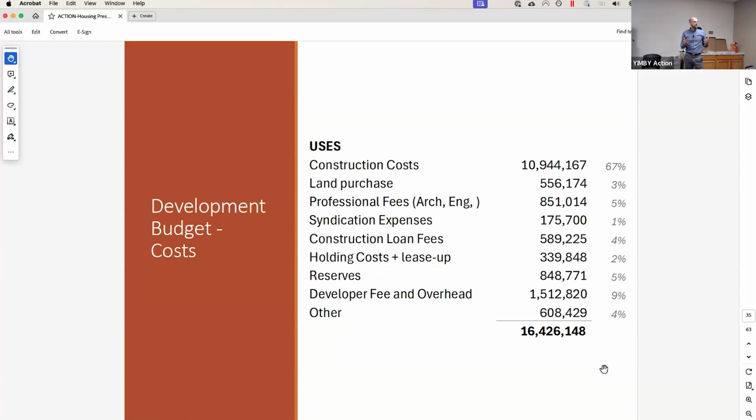One of the biggest is the RCAP, which is a state grant program, but it requires state prevailing wage and a lot of purchase requirements, like for American steel, a lot of different things that may raise the cost. Prevailing wage in particular is a quick 20% maybe on your labor, but a lot of the paperwork behind it, the compliance work, all that has a cost to it. That's really where the bulk of the difference lies.